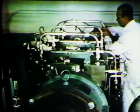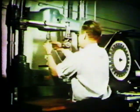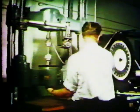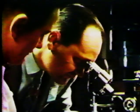It is possible to show only a brief representative selection of the many structural and systems tests which were performed as part of the Arrow project. The testing of systems and rigs, simulating flight and ground conditions, the testing of materials to ensure that they would meet design requirements. All this was carried out with one primary aim in mind. The first aircraft was not to be a handmade prototype. A comprehensive test program to prove all aspects of design was therefore necessary before starting tooling for production.